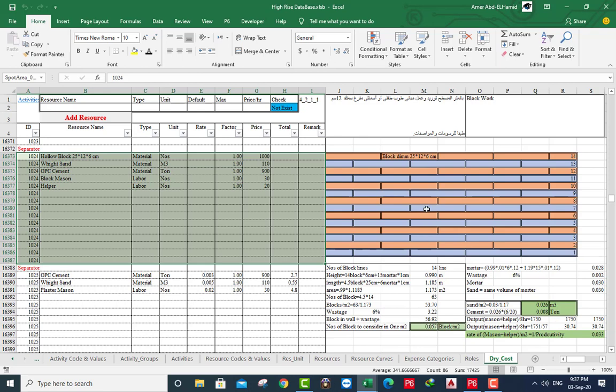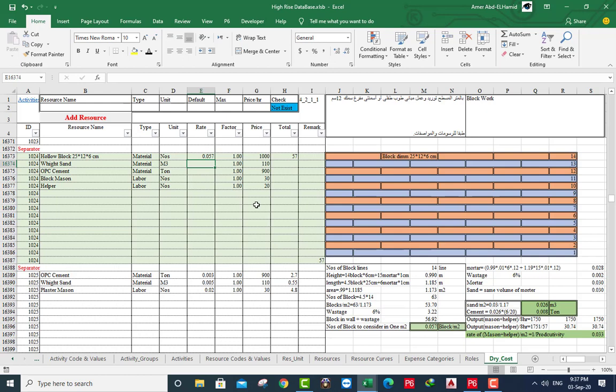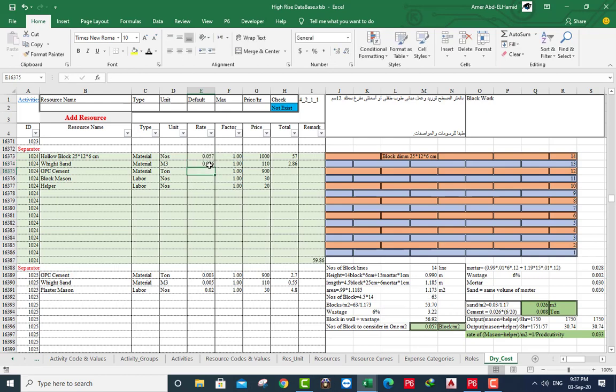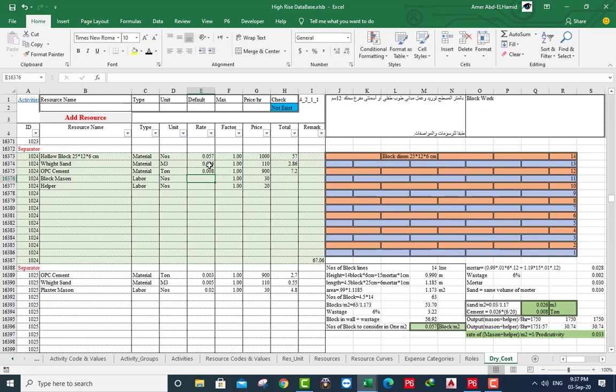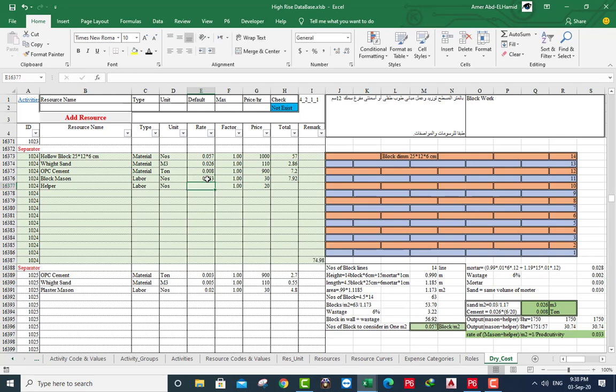One square meter have 0.057 of block, have 0.026 cubic meter of sand, 0.008 ton, one mason and helper in working 8 hours. The productivity will be 30 square meter. I use the rate. The rate equal 1 over productivity. If you consider this is the ideal area for working, if it's not or due to the site situation, you can change the factor.